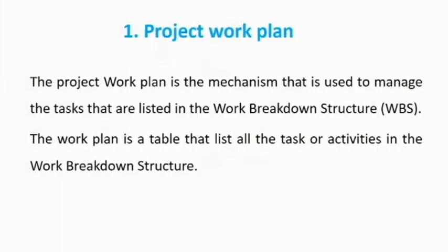One, project work plan. The project work plan is the mechanism that is used to manage the tasks that are listed in the work breakdown structure. The work plan is a table that lists all the tasks or activities in the work breakdown structure.